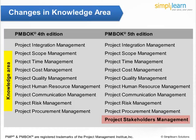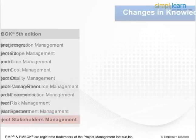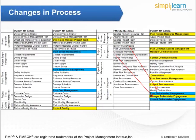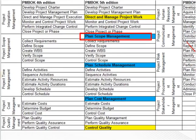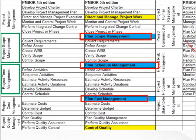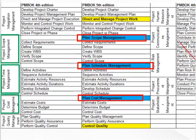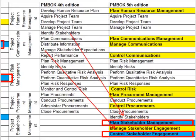Apart from this, 5 processes have also been added. The additional processes are: Plan Scope Management in Project Scope Management, Plan Schedule Management in Project Time Management, Plan Cost Management in Project Cost Management, and Plan Stakeholder Management and Control Stakeholder Engagement under the Project Stakeholder Management knowledge area. These are highlighted in blue.